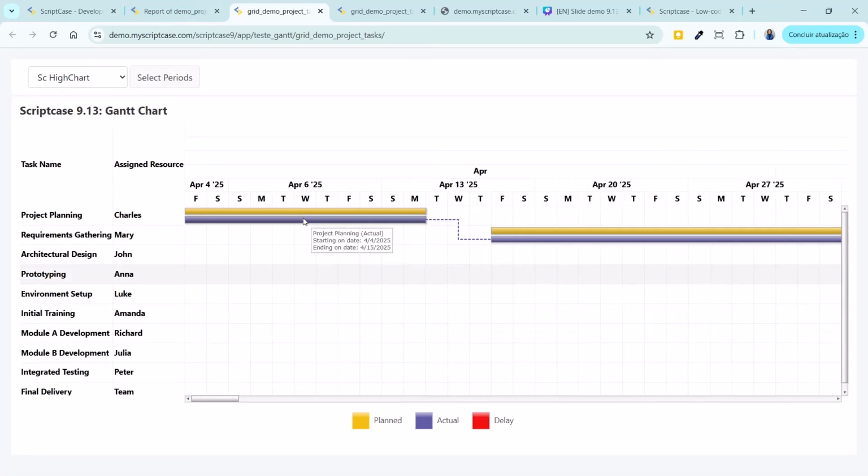And with the day option, you are going to have two lines to identify the day of the week and also the dates. So starting here, for example, in April 4, and then we have April 4, April 5, and then we go for the next week, always starting by Sunday, then Sunday, Monday, Tuesday, Wednesday. And here we start the week with the Sunday 6, and then next week Sunday 13th, and so on. So this is how we are organizing here the Gantt.